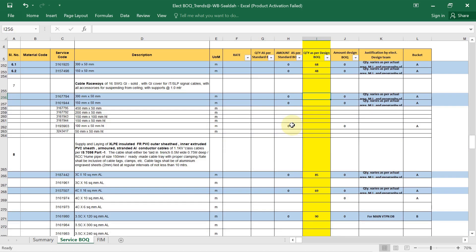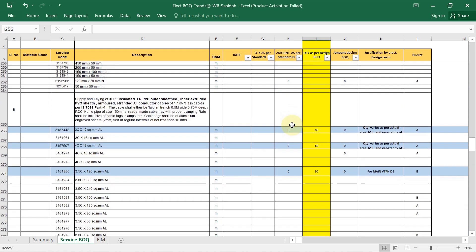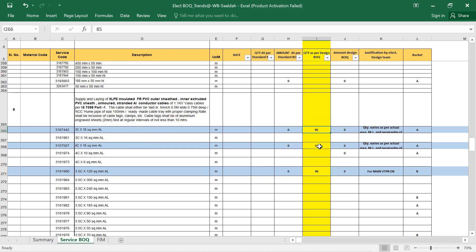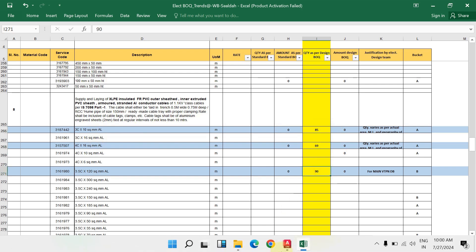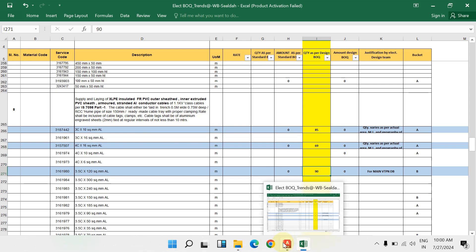Next: supply and laying of XLPE insulated PVC outer sheet, inner/exterior PVC sheet, armoured stranded aluminium conductor cable of 1.1 kV class. Their total detail: 3-core 10 sq mm aluminium cable running metres, and 4-core 16 sq mm cable running metres — write those down here.